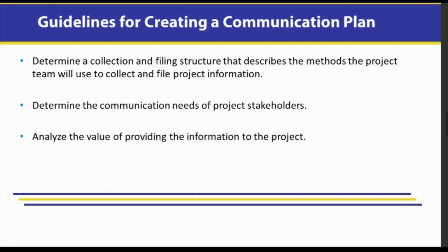The other thing that we need to communicate is our schedules. How do you know that somebody else before you is finished with their task, let's say, and you're going to take that product of that task and then you're going to run with it and do what you need to do with it? How do we do that handoff? Not assuming, because we're using Microsoft Project or we're using AtTask or whatever software you might be keeping up with all these tasks in, don't assume that people will know to go look and they're going to start on that particular day.